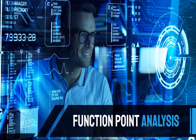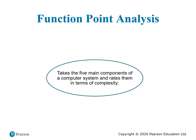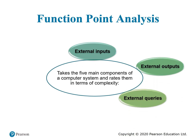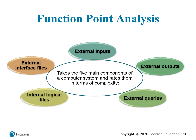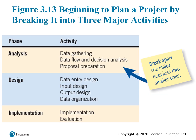During planning we need to perform function point analysis with regard to the software. Function point analysis takes the five main components of a computer system and rates them in terms of complexity. The five components are: external input, external output, external queries, internal logical files, and external interface files. We assess each based on complexity — whether they are easy or difficult to process in terms of input, output, and so on.